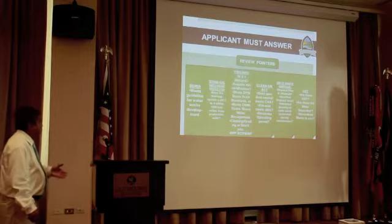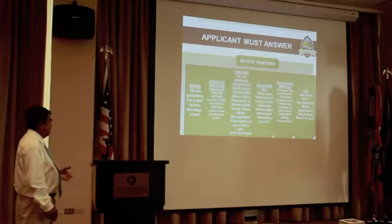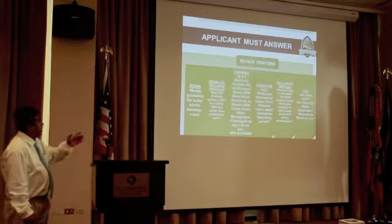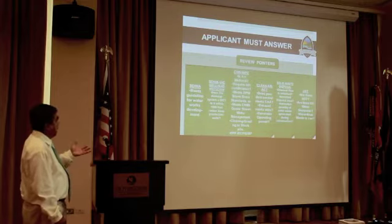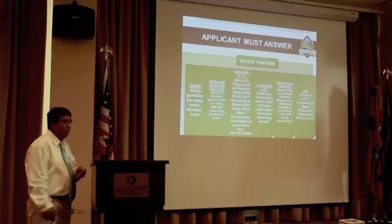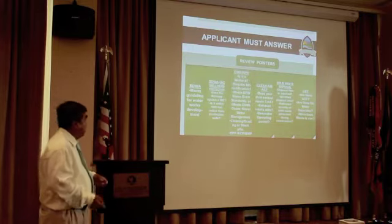They will be asking, does your dust control meet the Clean Air Act? Or does your exhaust meet the standard? Or do you have a generator operating permit? And after that, you have to bring the solid waste program. They will be asking the disposal plan. Is it a task? Did you identify your disposal area? Do you have an estimated quantity of solid waste that is generated during the construction?